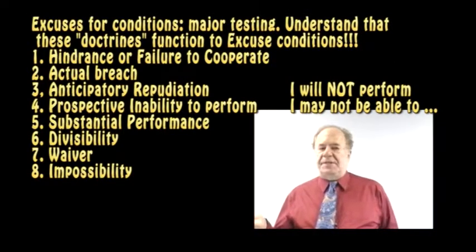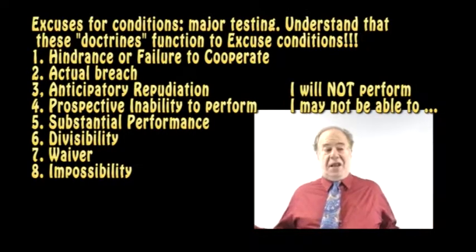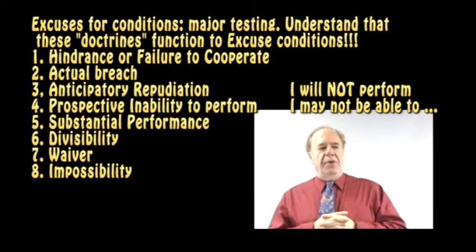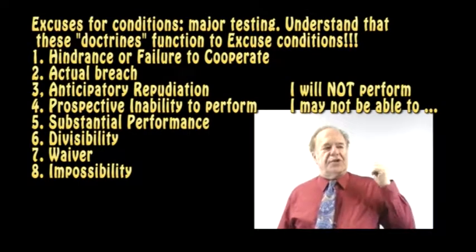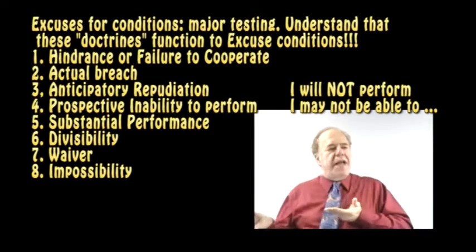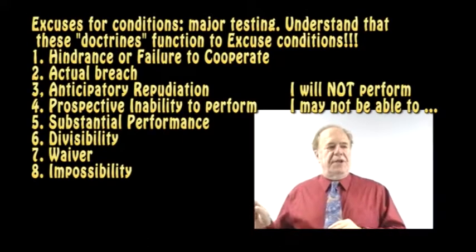I have not substantially performed the whole contract, so since I haven't substantially performed, can I collect nothing? If the promises are truly divisible, I can collect the $200,000 each for the first 3 houses, minus whatever damages I would owe for the failure to do the rest of the contract. Divisibility.